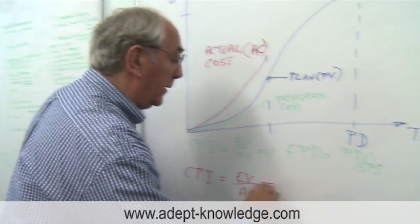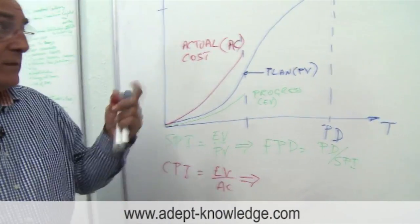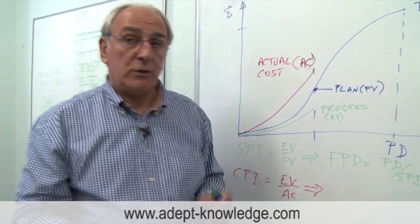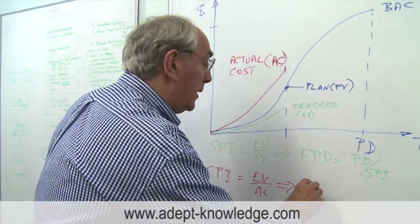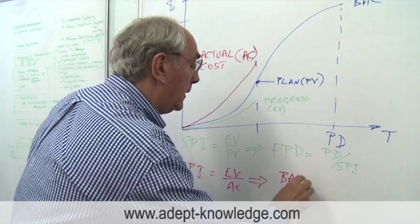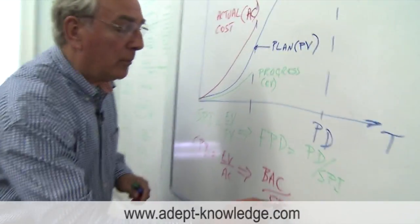Now we can use this to estimate our cost at completion or the estimated completion. And it's very simply the budget at completion divided by the cost performance index.